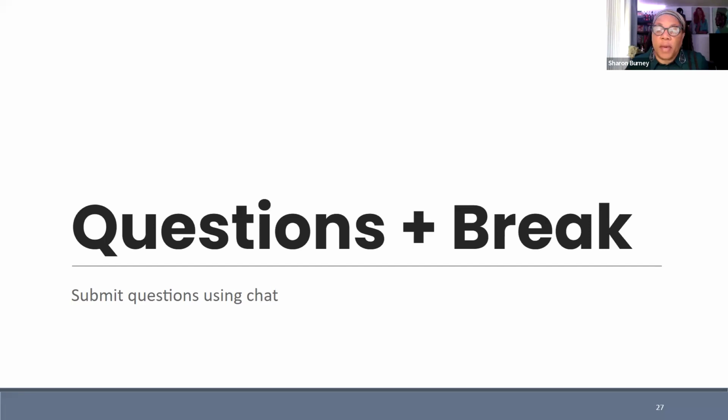Some projects it may make more sense to create a job ad and hire an archivist. And if you do this, staffing is an allowable expense. You can include that in your project detail and your narrative. If this is a new hire for the project only, then you upload a job description or ad. Make sure you include the hours, please, an equitable salary based on where you live, and fringe benefits to your budget information, the detail and the